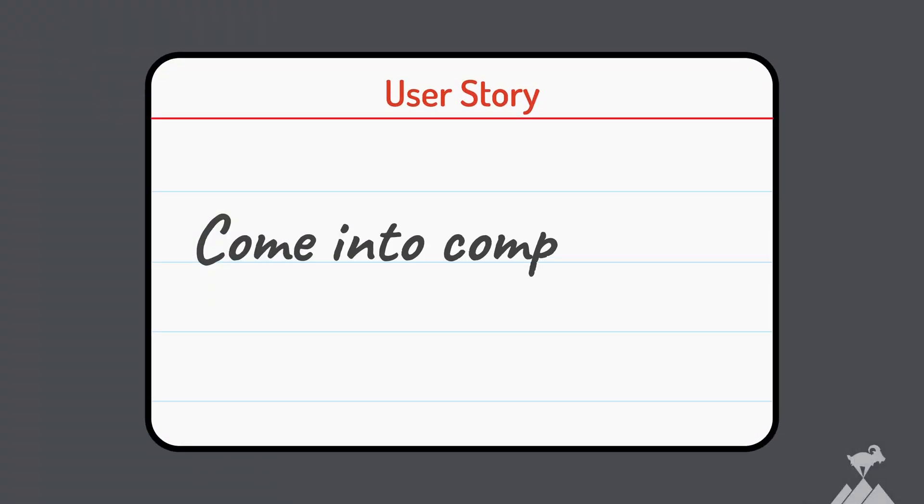Slow performance, security issues, failing to support a browser — you name it. Here's a better way to handle them. Start by creating a user story to come into compliance. Then, once you've got it working, add that requirement to your definition of done so you stay in compliance.